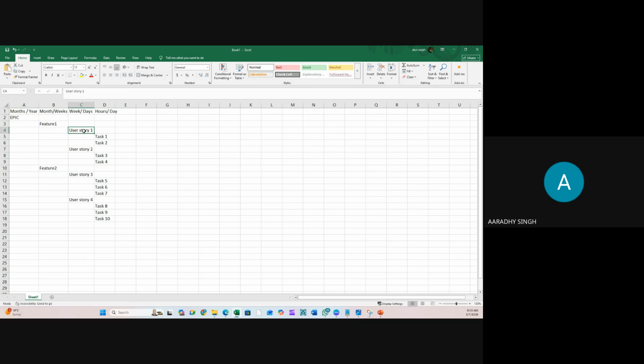Under the product backlog, or under the user story, you can create the task. In case you don't want to create any feature under an epic, and want to create a user story directly, that is also possible. So here, guys, you'll get a free hand in how you want to design your system or project. For example, suppose I have one epic available. Under this epic there's no development, only some tasks will be assigned.